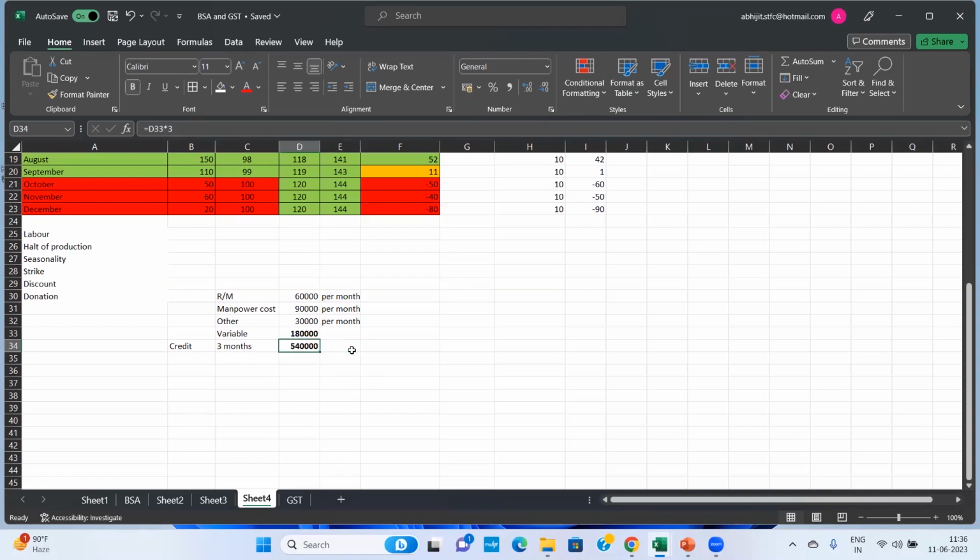Add 20 more percent to it, and keep this as your working capital. Always you should keep some buffer, because you never know about contingency.